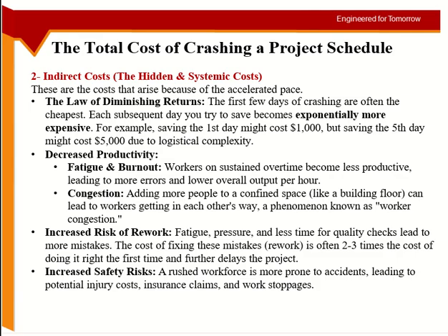So this is the whole idea behind it. When they make mistakes, when their productivity is low, you have to do rework, and you may have to completely destroy a column or a beam because it was not done properly, just because people were tired or they were not paying attention. Already mentioned about the accident. When an accident happens, it's not like one labor got injured, I will remove him from the site and everything is done.